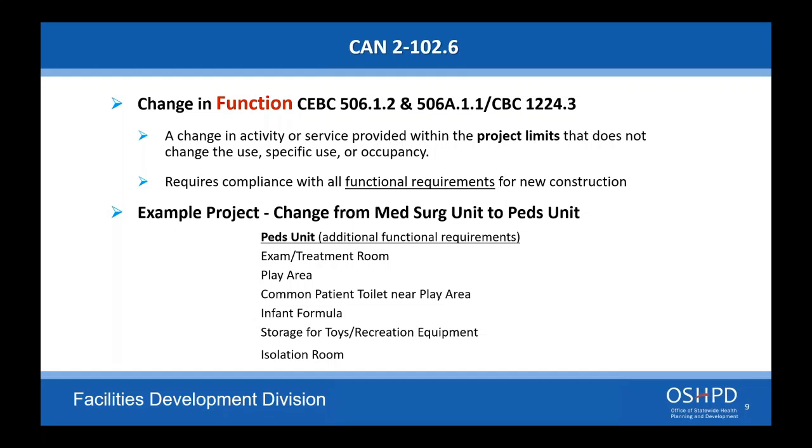Really, it's just what's needed to get the approval of the project and to understand what the project's doing. And if it's very, very clear, you're remodeling a toilet into a toilet and just moving things around, you probably don't need one. So when in doubt, just go ahead and give us a call or provide one. It always helps to have them. But again, don't put the huge effort into providing a 100-page functional program. It's a 1-page remodel of a toilet to a toilet.